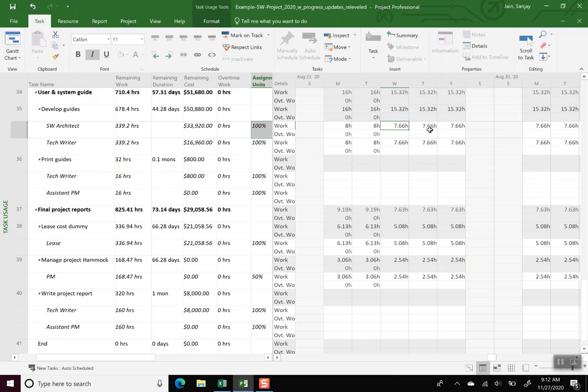This is because of the variances that have been reported and implemented on the remaining duration of the activity. Per the variances, we had a +5% variance on time and a -5% variance on work. Essentially that's saying that we are doing work, but in longer time.